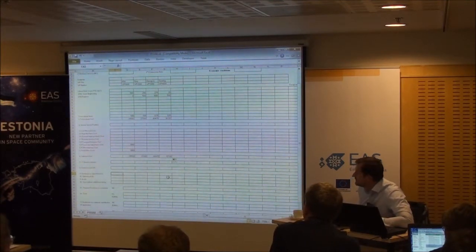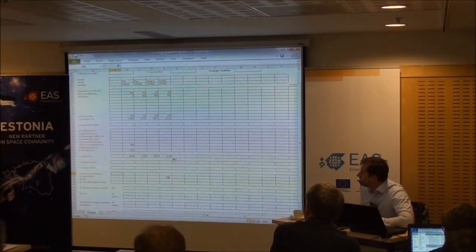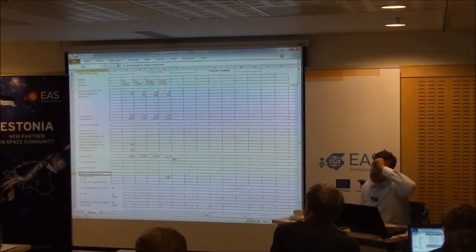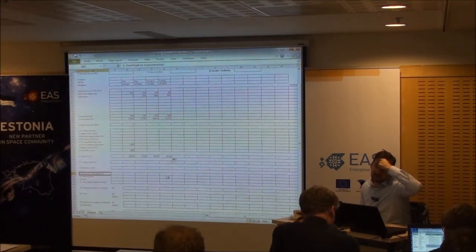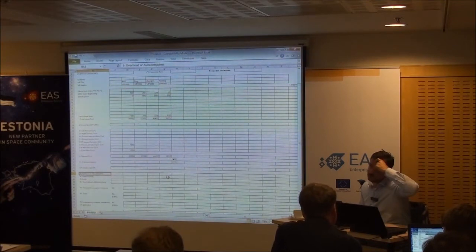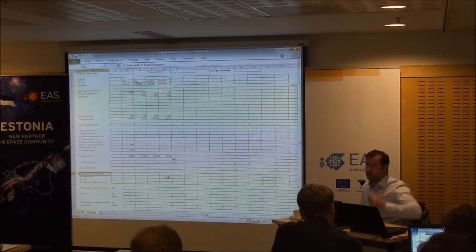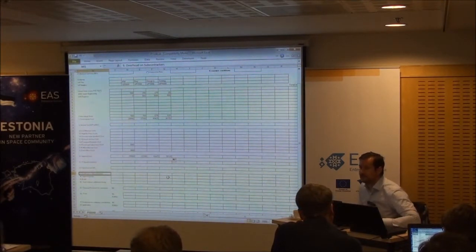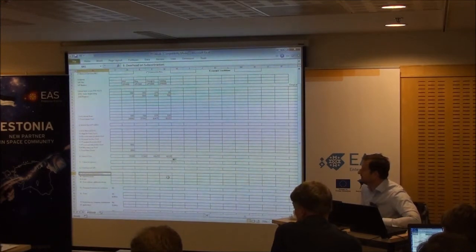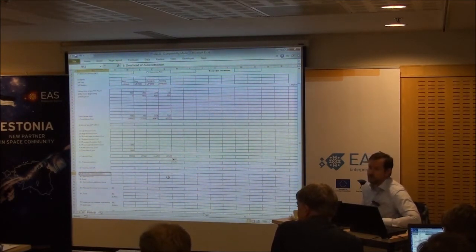You'll sometimes need to think about this overhead on subcontractors, what's referred to as pass-through revenue. This is something you need to understand in your own organisation. Big organisations don't tend to like pass-through revenue, mainly because it waters your margin down.